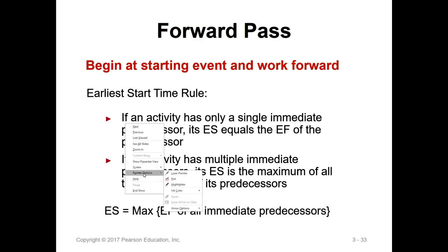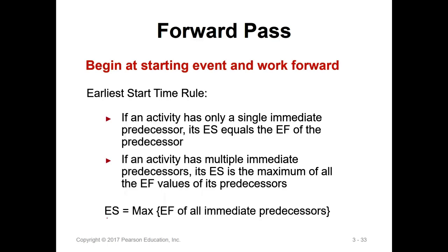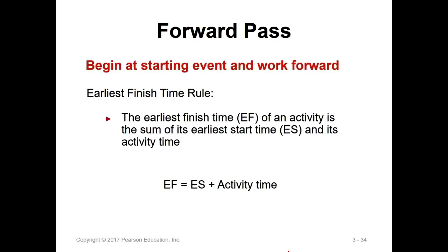And the second rule, you can simplify this as the maximum of the early finish of all the immediate predecessors. And then what is the early finish? Early finish equals early start plus the work duration, the activity time.